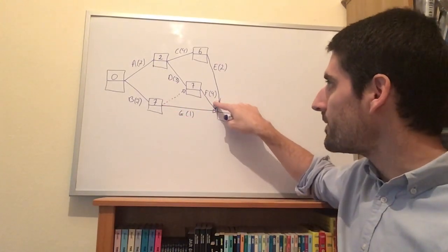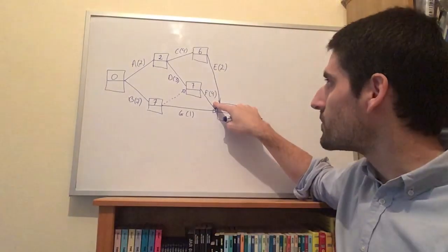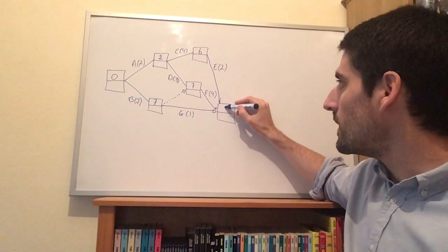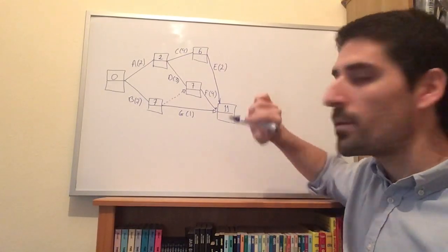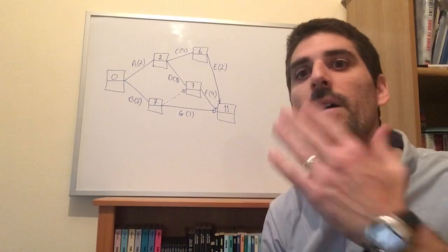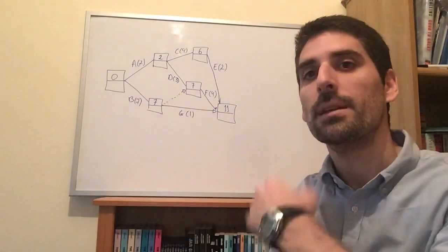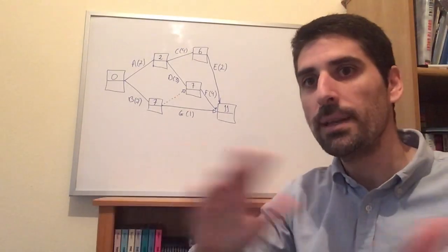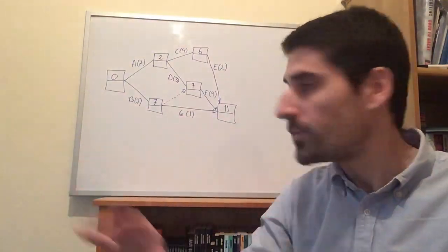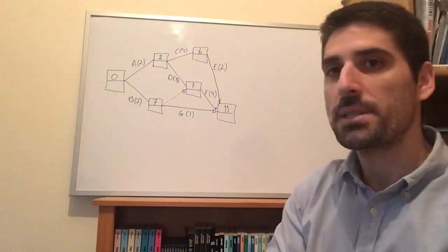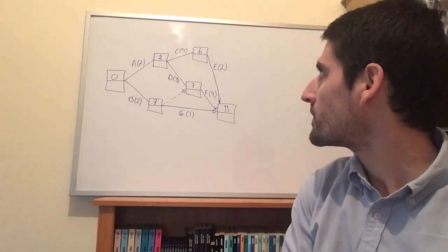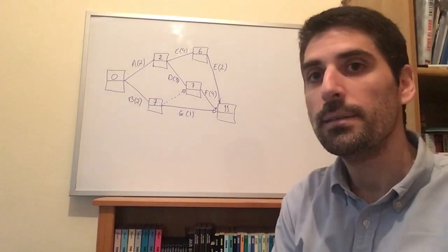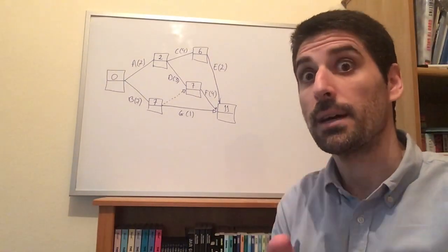But activity F can only start after D and B have been completed, and we need our 7 hours plus 4, 11. So 11 hours is the earliest time that we could complete the whole project in. That's if everything runs smoothly, it would be 11 hours that we could complete the project. And that is how you find the early event time.